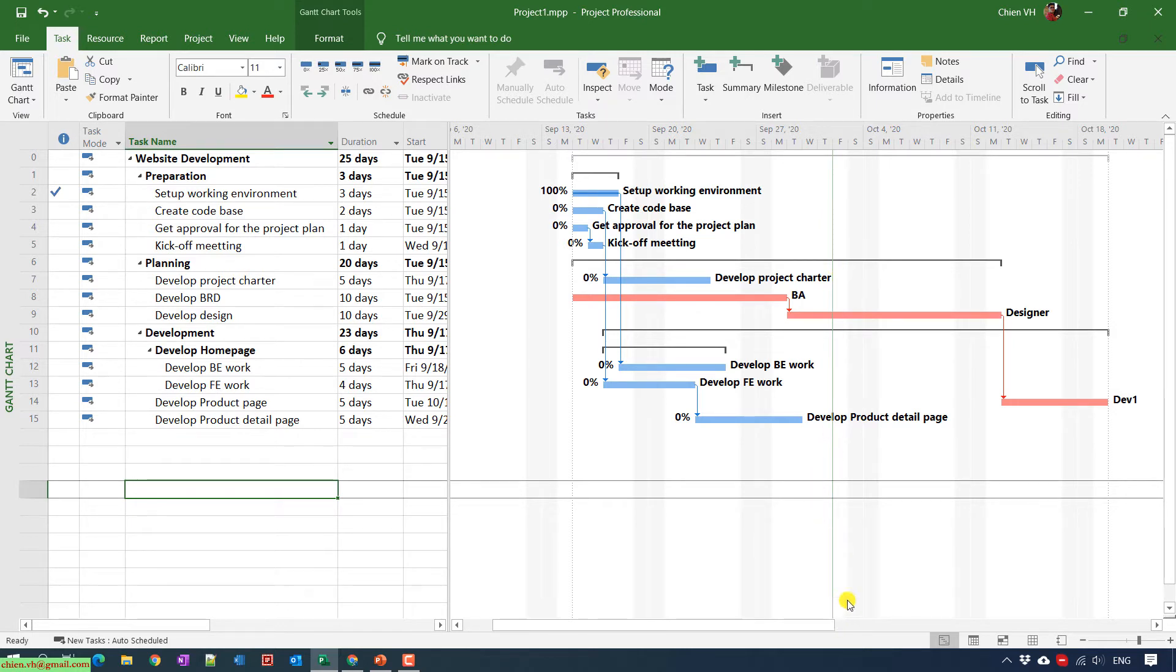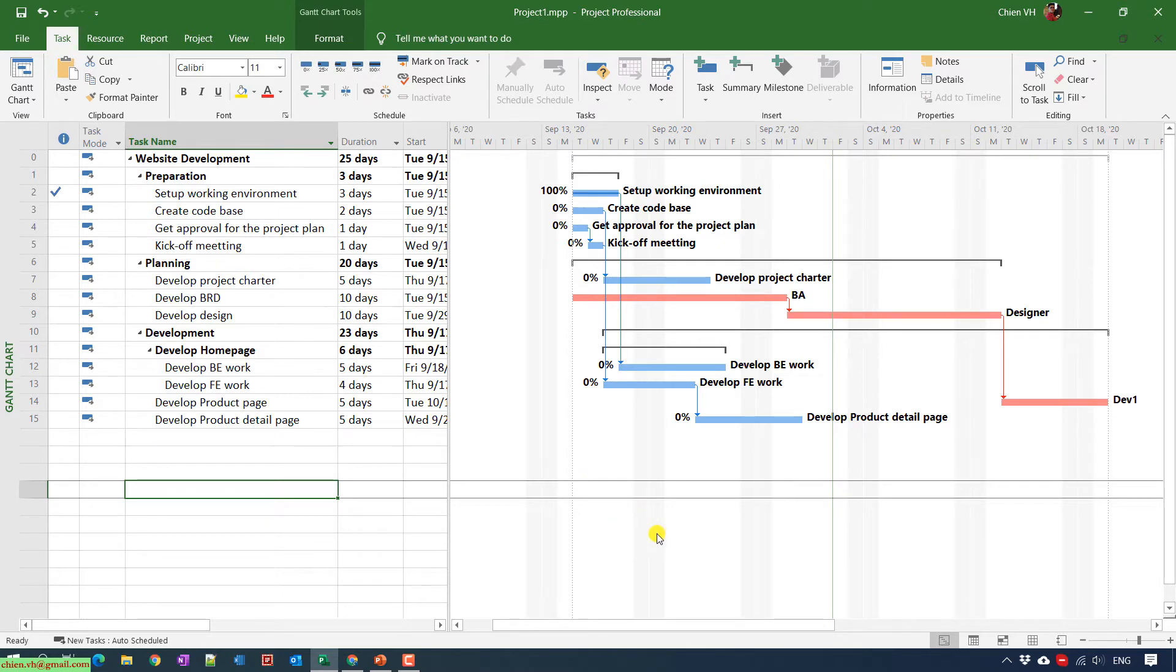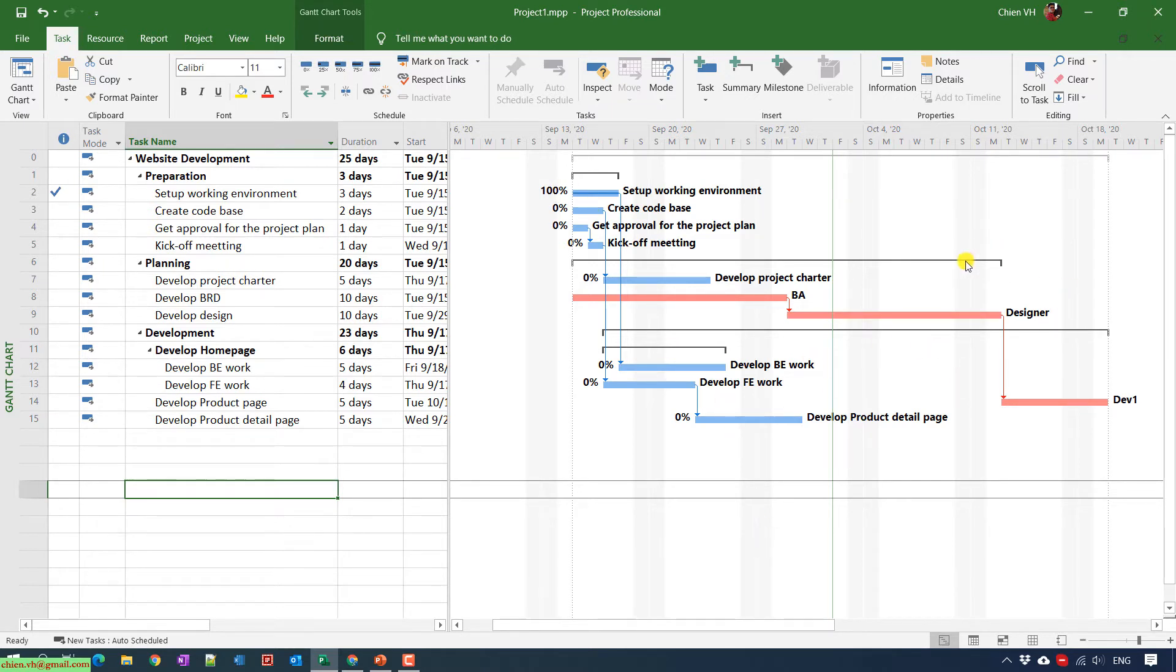If you see any task on the left side of this line with the completed percent less than 100 percent, that means that task is behind the schedule.